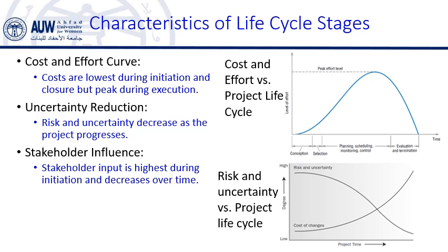Last, we can see the stakeholder influence. The stakeholders are most critical during the initiation and planning phase to ensure the project's goals align with expectations, while in execution and monitoring and controlling, their influence is diminishing, although they may still provide approval or feedback. At the closure stage, the stakeholders are needed for accepting the deliverables of the project.